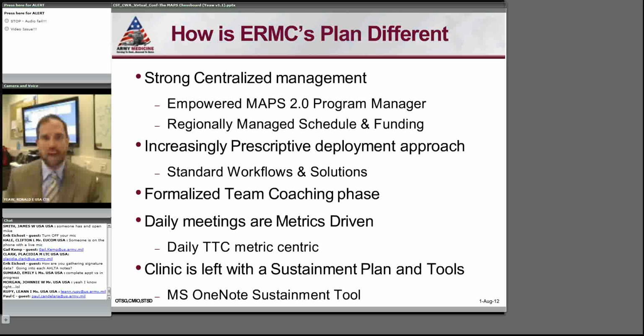Additionally, our schedules are managed and funded by a central source. We never do 2 MAPS 2.0s in a row. We always bring resources to bear. I just left Wiesbaden. Wiesbaden has 2 clinical system trainers. I brought 5 others from clinical system trainer sites around the region.